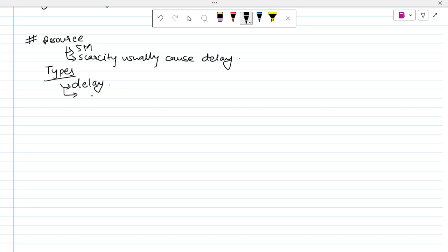We may not get the material supply as expected, so our project is delayed for 1 or 2 days. That is a start delay. Another is that our non-critical activity can be converted into critical due to other constraints.